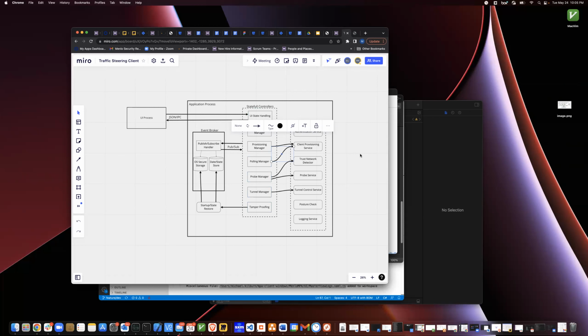What we do need, if nothing else, is to create placeholder epics for everything. If we work backwards from the date, we know that we have to have windows done by a certain date. We can put dates onto these epics, like this epic has to be done by this sprint, this epic by this sprint, and this epic by this sprint. Then as we go along, if things are slipping, we can deal with it.